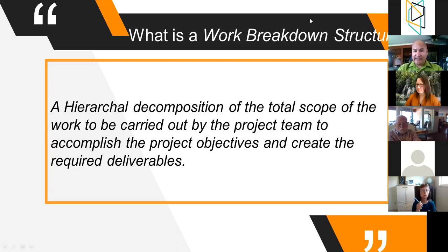But we project managers, oh, we're a special breed. We see things completely differently, and we break it down into physical deliverables, okay? So when we have a pen, we look at, there's a pen body, there's the cap of the pen, there's the pen ink, okay? Once we broke it down into physical deliverables, then we can go into the activities. So going from the noun to the verb, okay?